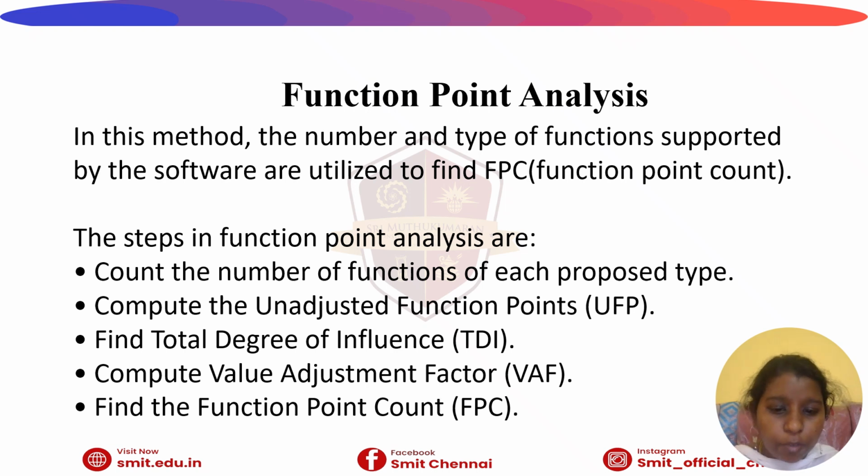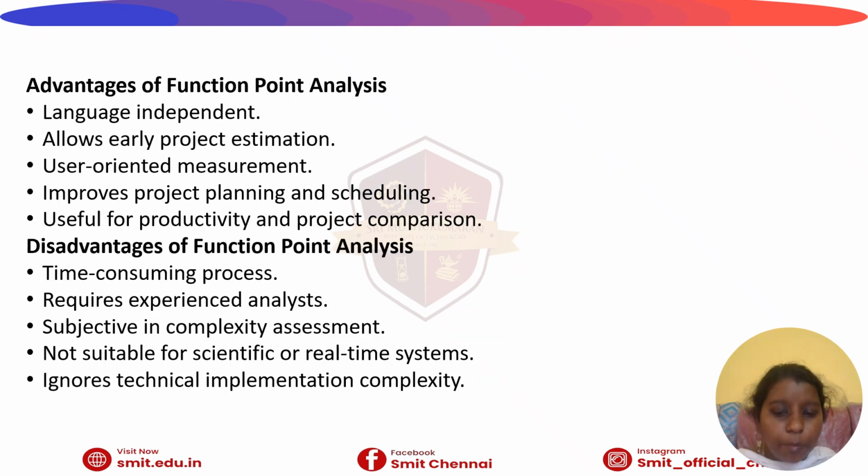Some of the steps of function point analysis are: count the number of functions of each proposed type, compute the unadjusted function points, find the total degree of influence, compute the value adjustment factor, and find the function point count. And some of the advantages and disadvantages of FPA are: